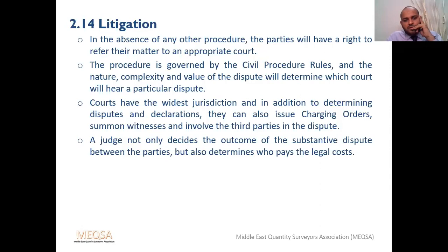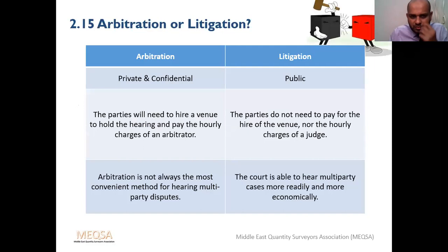In construction contracts, construction issues, we do not prefer this because most of the judges are from legal backgrounds. They don't have construction knowledge and don't know what is going on here. So that's why arbitration is more preferred, because our issues, our problems, are more complicated than the normal issues. So we'll have a quick comparison between arbitration and litigation.